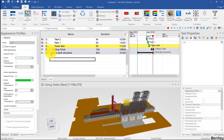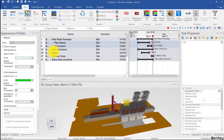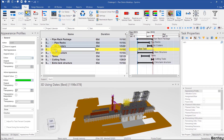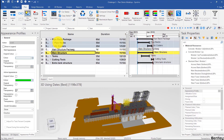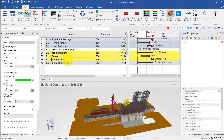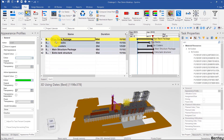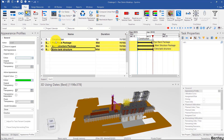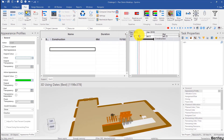Finally, let's tidy up our schedule. We have the extra tank structure, the cutting tools, the main structure — these all fall under the main structure. So I can use Ctrl+I and call that 'main structure package', then indent those. Then I can add one task on top — Ctrl+I — and call this 'construction', and then indent everything underneath. And we're done. We have a 68-day schedule that we've created in Synchro from scratch.